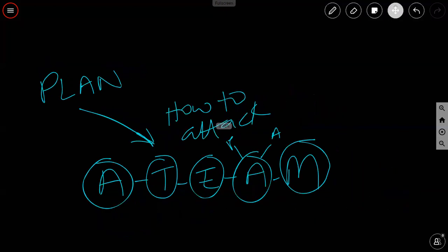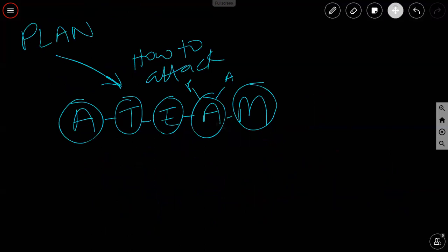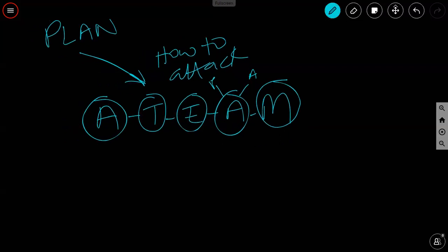This is pretty much what you do when you plan. You identify the risks, you analyze them, and you decide, what are we going to do about all these risks? Especially the top ones. Some companies have a threshold, and the risks that are not huge in terms of probability or impact are put to the bottom of the risk log. And those that are really top, big risks, those get to the top of the risk register. And then we carry out some of these transfer or avoid, or we actually go after those things. All right, so that's your mnemonic, A-team.